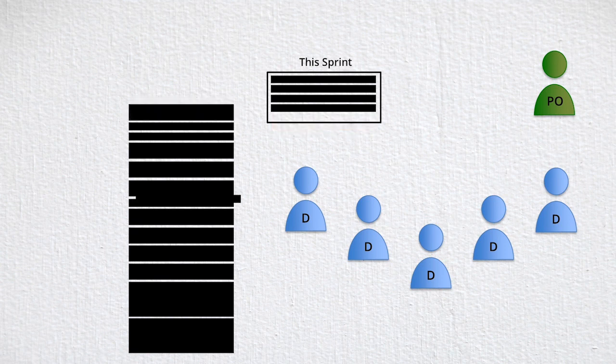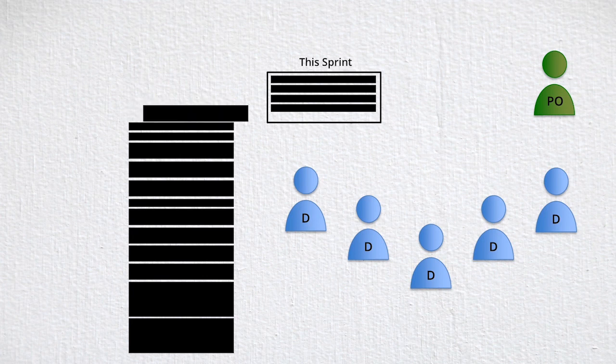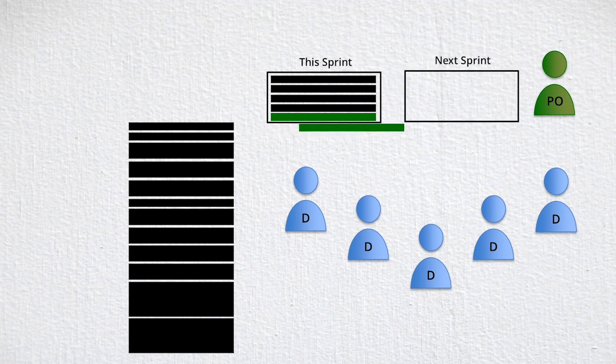Instead of trying to squeeze a small enough PBI of lower business value in, I generally recommend that teams simply acknowledge that they intend to start on the next highest business value PBI without the expectation that it will be completed in the same sprint.